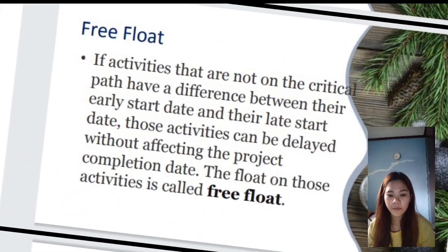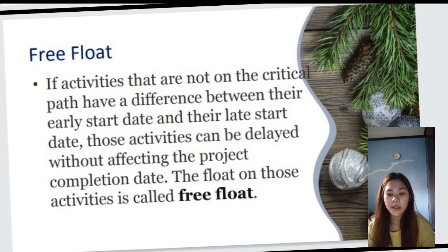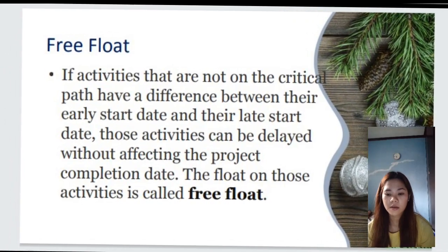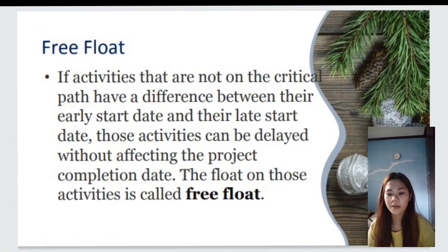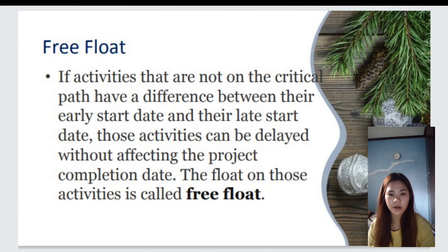Next is free float. Activities that are not on the critical path have a difference between their early start date and their late start date. Those activities can be delayed without affecting the project completion date. The float of those activities is called free float.